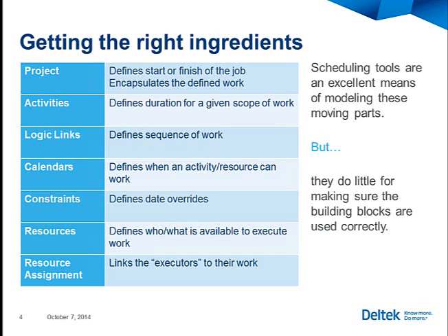Constraints. These are where you decide that March 30th is the date for something and you put that into the schedule. Well, what if the sequence of tasks leading up to March 30th are too long and they're trying to push past and they're putting pressure on that March 30th date? Well, should we in fact have overridden when the scheduling system would have calculated this time? Or are we justified in putting that March 30th date because that's where we've committed this work would be done?